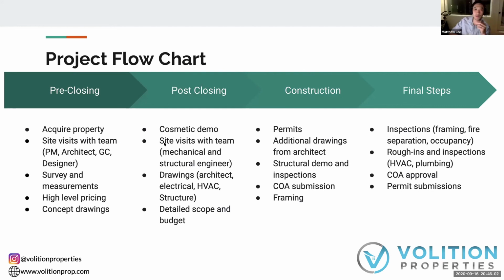How much are development fees? They vary. I think I heard $45,000 per unit. Yeah, that was actually missing some. So basically, roughly speaking, for every 2-bedroom unit, once you combine development charges like educational levies and the park levy, you're into about $60,000 per unit.